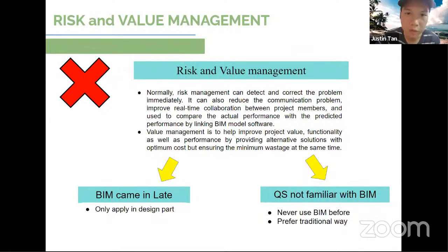Okay, good afternoon. For this MBKT project, there is no risk and value management for the project because the use of BIM came in after the project starts. Therefore, the usage of BIM only focuses on the design part. The QS did not use BIM to do the costing because the QS is not skilled in using BIM software. The QS just calculates and changes the cost manually when there are design changes because they prefer to use the traditional method. Okay, that is all for me. I will pass it to the next presenter.